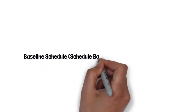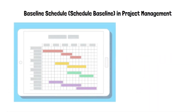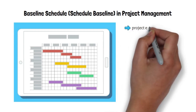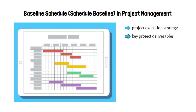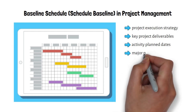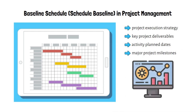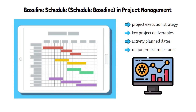A baseline schedule is a main project management document that should be created before the project starts. It demonstrates the project execution strategy, key project deliverables, activity plan dates, and major project milestones, as well as providing you with the ability to monitor and track how a change in one activity affects the whole schedule.